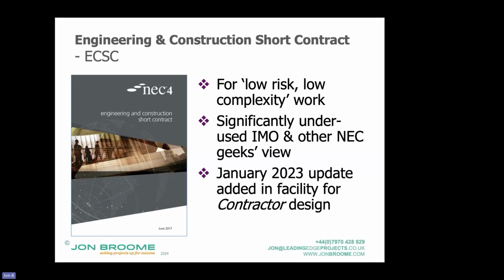No. So if you let a contract under the full version, they will do one of two things. They will either price in all this project management, which is not needed, and you'll have an expensive contract, or far more likely, they won't do the project management stuff. So they will be in breach.